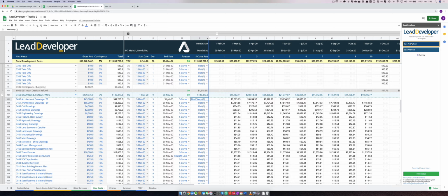So in this scenario, I know that it will not be the exact same payment. But if you look at any of the straight line distribution methods, here I've got this 125 with 5% contingency, which is 131.3, and it has distributed it at exactly the same amount.